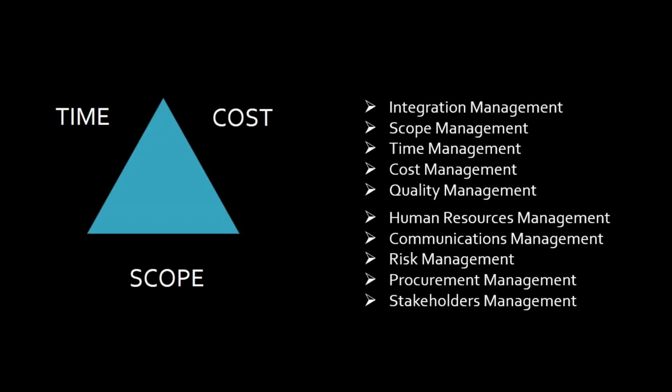Even, let's grab something like risk, for example. If we actually analyze the risk and we saw something in the schedule that might be a problem, now we go back and we schedule around it, or we avoid it or something. But because we did risk management, it affected our schedule management. This is what I'm saying, okay?